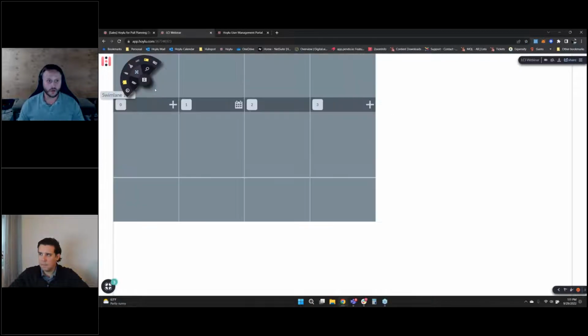So here we are, we're going back into the workspace here. And let's start from scratch, okay? So right now we have 4 columns, we have no dates on them. And we do that intentionally. Maybe we want to have an anchor date that's 6 months out and we're planning for something in the future. You want to be able to set it up as such. Or maybe you just want to sequence a bunch of activities without any dates on them at all, which is a common workflow that we've seen. And then you put dates on them after the fact. That's how you can get started.